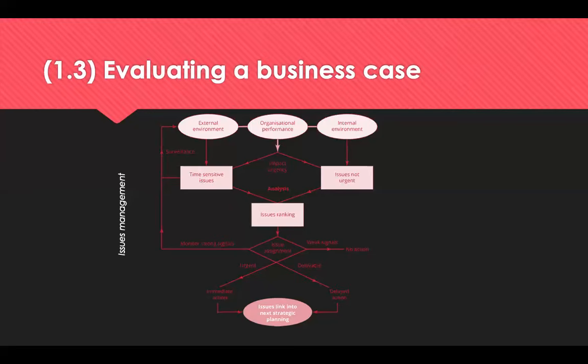Risk assessment selection shows the major risks that have been considered and the actions to take to eliminate them. And then an implementation plan covering things like whether roles and responsibilities have been allocated and agreed, the suitability of the communication strategy, whether there is a change management strategy, whether the specification and procurement route has been agreed, and the time allocated for key tasks such as writing tender documents, negotiating and writing contracts.